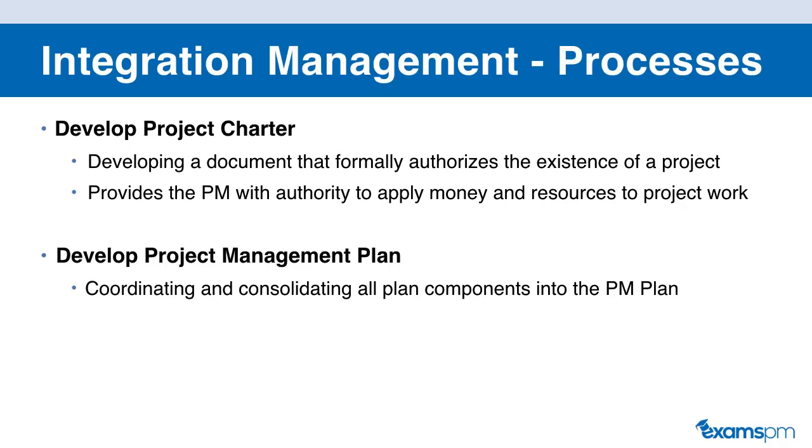Now, after the project charter has been developed, we move on to developing the project management plan. The project management plan consolidates and integrates all of the other planning components into one place in order to form the project management plan. So this is a master plan that includes all of the subsidiary plans from all of the other knowledge areas and additional documents into one place. And that's why it belongs in integration management. So throughout the entire integration management knowledge area, you're consolidating all of the other materials from all of the other knowledge areas into one place.